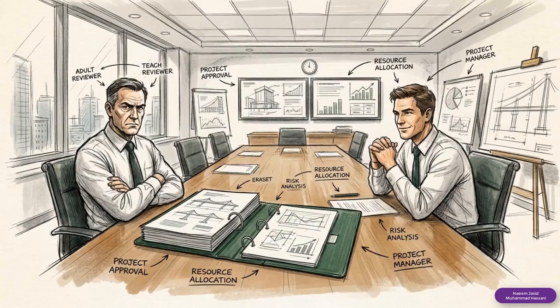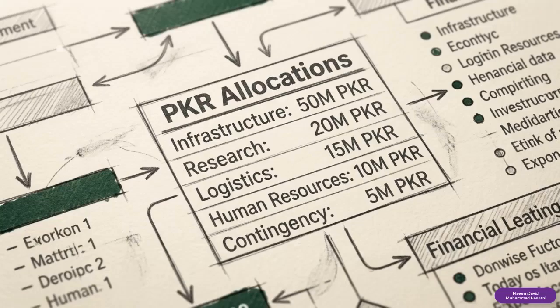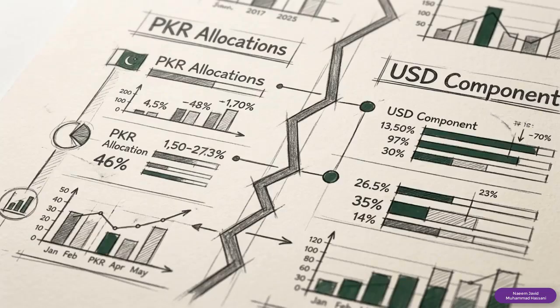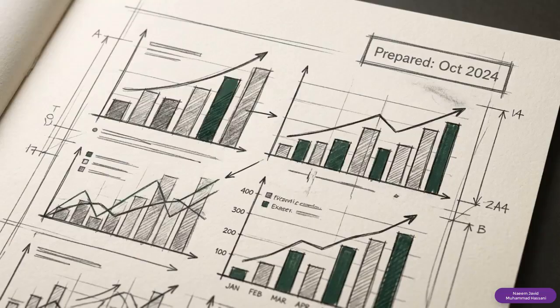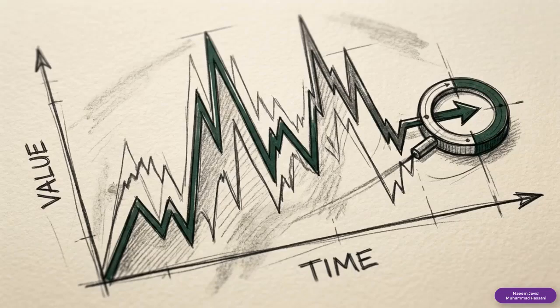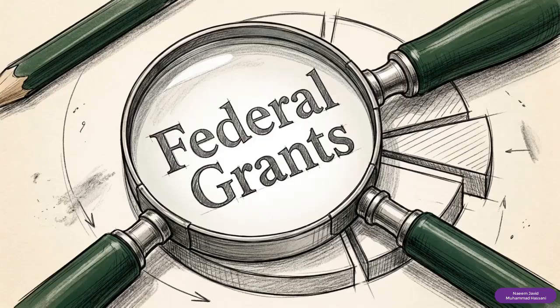Establishing the project's legal applicability and historical context prevents the CDWP from dismissing the proposal before they even review the financials. In the capital cost breakdown section, precision is mandatory. Vague financial estimates often result in an immediate rejection during the initial appraisal. You must separate local currency requirements from the foreign exchange component. Imported items bought locally remain local components. State exactly when these cost estimates were prepared to ensure pricing reflects current market conditions. Your PC2 must also identify specific sources of funding, like relevant PSDP allocations.